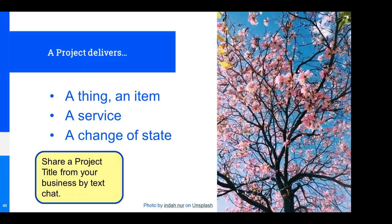The third thing a project can deliver is a change of state. For example, you want to get a quality accreditation for your company. The company applies, does all the work, goes through the examination, gets the report, and receives a certificate saying you've got it. The difference between before and after is the state — you've changed from not being recognized for quality to being recognized.